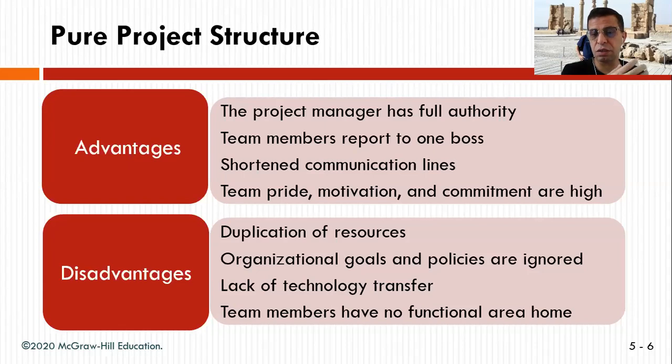The disadvantage is duplication of resources, because you need somebody to replace these people if you're going to put them in this project. Organizational goals and policies are ignored because they're focused on their project and they're part of that project. And usually when it's done, there is a lack of technology transfer. They don't do technology transfer. And team members have no functional area home, so they're worried about after the work whether they're going to stay in or they leave.